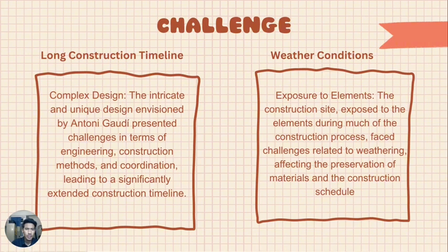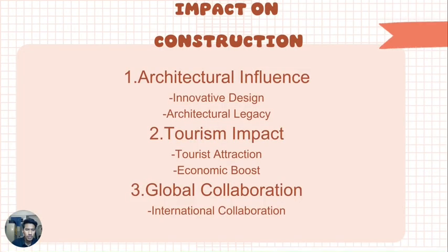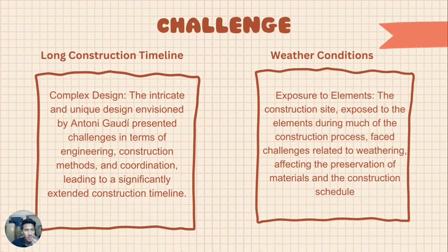All right, so let's see the first challenge, which is the long construction timeline. Okay, complex design. The intricate and unique design envisioned by Antoni Gaudi presented challenges in terms of engineering, construction method, and also coordination, leading to a significantly extended construction timeline.